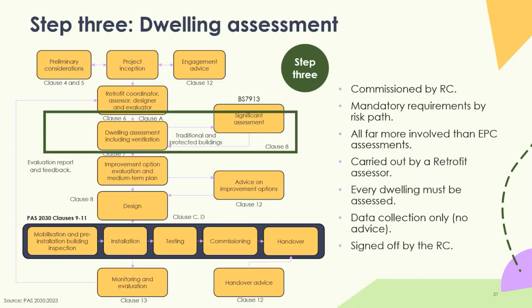Step 3, the dwelling assessment. As I said, this is the retrofit assessment, and it's commissioned by the retrofit coordinator. They may well be doing the assessment themselves, but they also may be choosing a particular retrofit assessor to carry out that assessment.